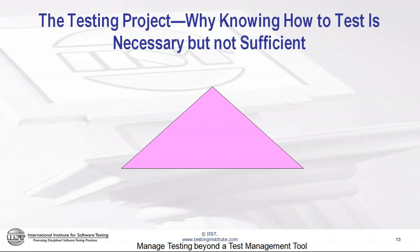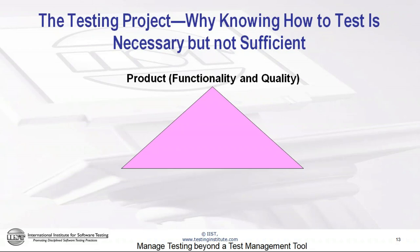Many of you may be familiar with the project manager's triangle, which gives us a different perspective and hopefully makes it clearer why simply knowing how to test is necessary but not sufficient for a successful testing project. The project manager's triangle identifies three major variables: the product or scope — which is the combination of functionality and quality, because functionality and quality cannot be separated entirely but are not the same — second, cost, which is primarily a function of resources and staffing, and third, time or schedule.